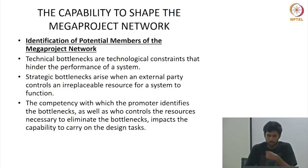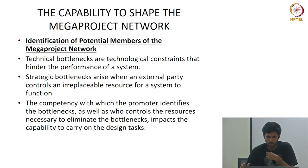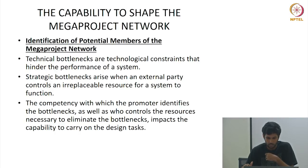The capability to shape mega projects — the identification of potential members of the mega project network involves identifying technical bottlenecks or technical constraints that hinder the performance of a system. Strategic bottlenecks arise when an external party controls an irreplaceable resource for the system to function. The competency with which the promoter identifies the bottleneck, as well as who controls the resources necessary to eliminate the bottlenecks, impacts the capability to carry on the design task.